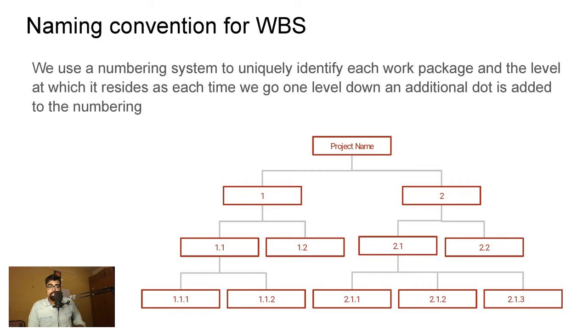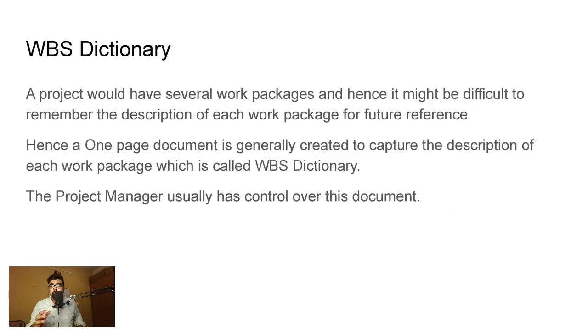Usually, this is the standard that is being followed across, but there are a few companies who use the project name in front of those numbers and then make sure that is also added each and every time a work package is being called up. Usually at a program level, they might have multiple projects, so it becomes easier for them to track it that way. And that is the reason why they prefix it with the project name.